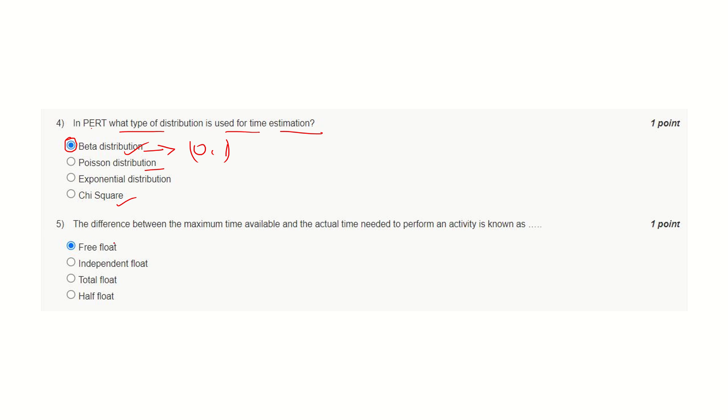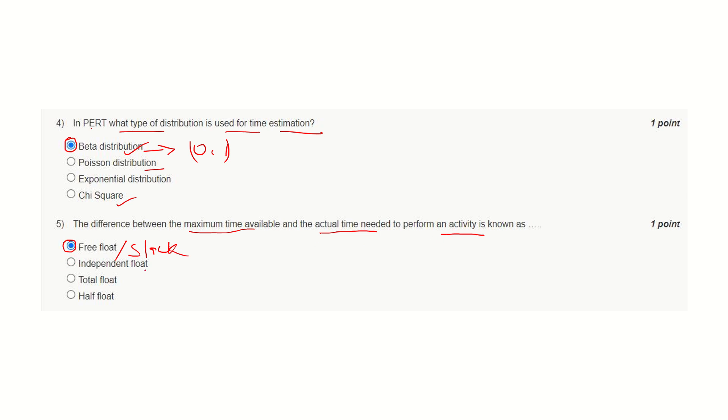Question number five: The difference between maximum time available and actual time needed to perform an activity is known as free float or slack. Independent float—if more than one activity is there, it may come into picture, but may not be correct for this statement. Similarly for total float. Here the correct answer is free float.